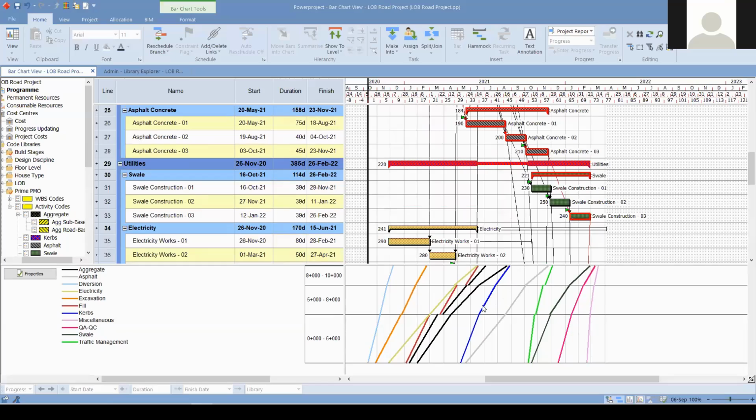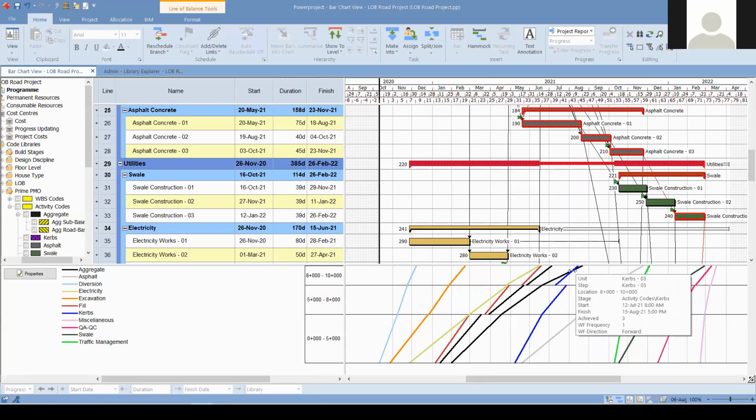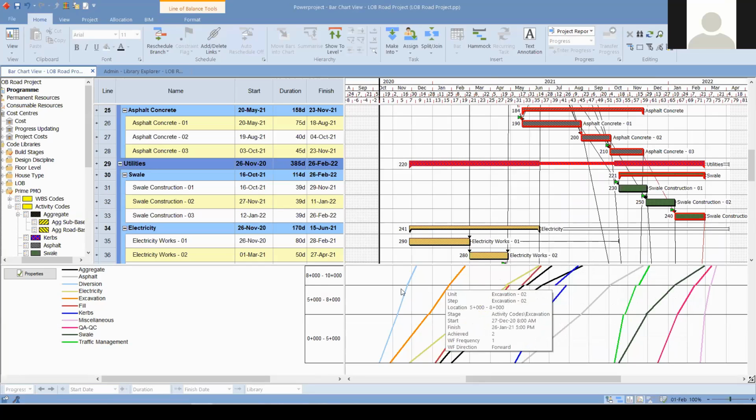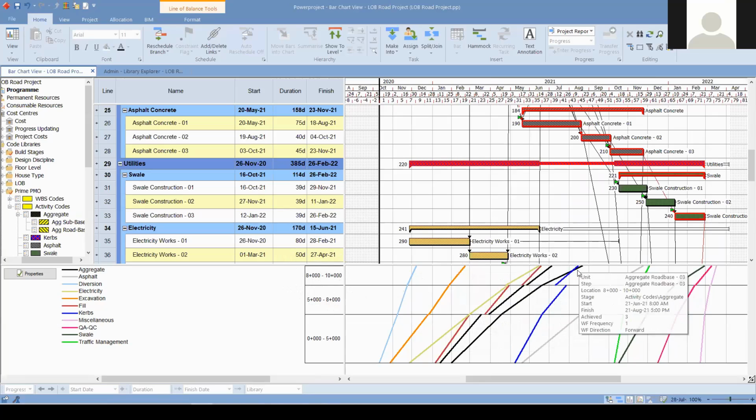After that, you can change the start and finish dates, any relationships, to maintain these activities flow without any stoppage, and also so they do not collapse. As you see, if this is collapsing, we are making sure that on the same location and at the same time, these crews or these activities should be executed in the most optimal time.